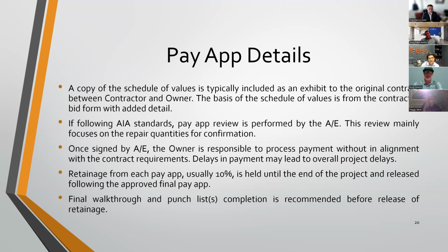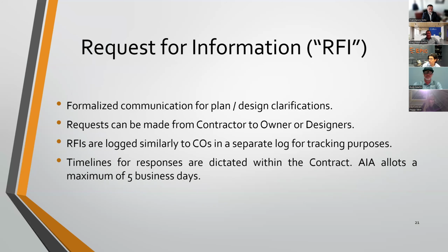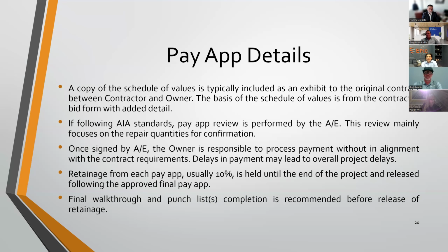What's fair? Well, so if we're talking typical construction, the traditional turnaround was 10 working days, but I think that's down to about 5 now for engineer review, then owner review, then submittal for payment. And ultimately, I think you could probably get the pay app turned around between engineer and owner rep within 10 working days. And then it's however long the PM company takes to cut checks from there. So, I would reasonably say somewhere between 30 and 45 days should be a reasonable turnaround.